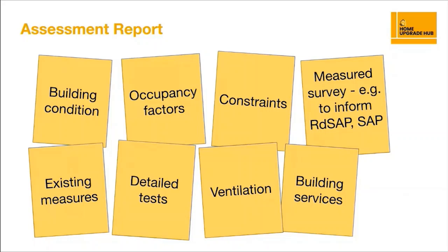Measured surveys at this stage would probably be quite limited, so it's what would usually be done to inform an RdSAP or a SAP type assessment. So it'll be things like window opening sizes and overall dimensions. Detailed tests might be involved, but quite often come a little bit later as part of the design work. And although this might seem like a lot of quite disparate stuff, it's important to note that software solutions have been developed now that help to bring all of this together into quite a streamlined process for assessors. So there's plenty of products out there that can help with this.